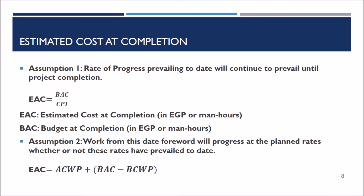Reverting back to the estimate at completion (EAC), there are two assumptions to calculate it. The first assumption is that the rate of progress prevailing to date will continue to prevail until project completion — in this case, you divide the BAC by the CPI to calculate the EAC. The second assumption is that work from this date forward will progress at the planned rates whether or not these rates have prevailed to date — in this case, the EAC is calculated by adding the actual cost to the estimate to complete (ETC).